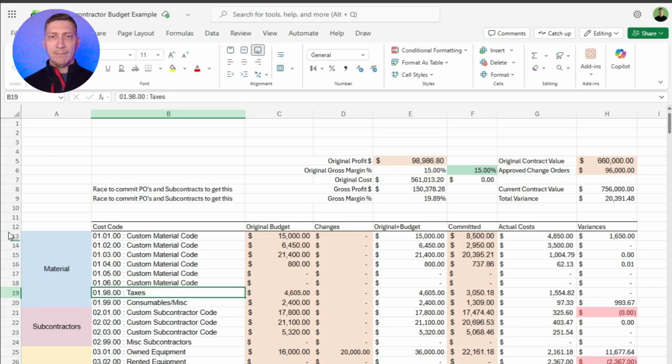And so we kept going back and forth, and that's why we were wasting time and materials trying to make it work. So at the end of the day, what we decided was, instead of doubling our labor budget, which would have gone from $1 million to $2 million, and increasing our rock budget for the encasement, which would have gone from $500,000 to $750,000 the way we were doing it.